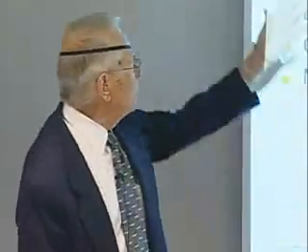So these Phase B studies that we had showed that we were going to have a development cost of someplace between 12 and 15 billion dollars for R&D. And about that time, Nixon had a meeting with Fletcher and said, you can build any kind of shuttle you want as long as it only costs $5 billion.